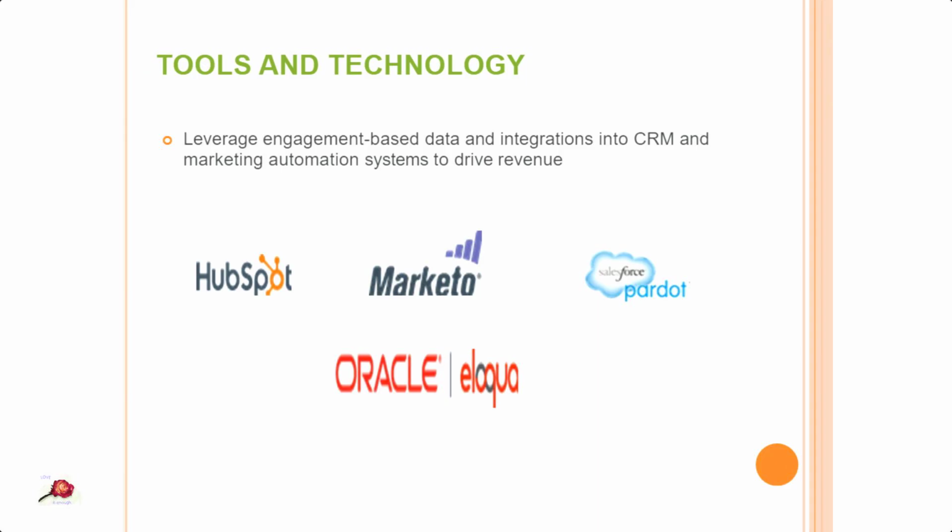Anyway, next up we have sprint backlog. Sprint backlog is a list of items from the product backlog that need to be worked on during a sprint. So team members sign up for tasks in the sprint backlog based on their skills and priorities. As the sprint evolves, it is possible that slight changes to the sprint backlog might occur. A new understanding of the feature the team is working on could mean that something is added to or removed from the sprint backlog. So the sprint backlog is a real-time picture of the work that the team currently plans to complete during a sprint. Well, if it seems too much theory, don't worry about it. When we discuss how the Scrum process actually works, you'll understand what a sprint backlog is.